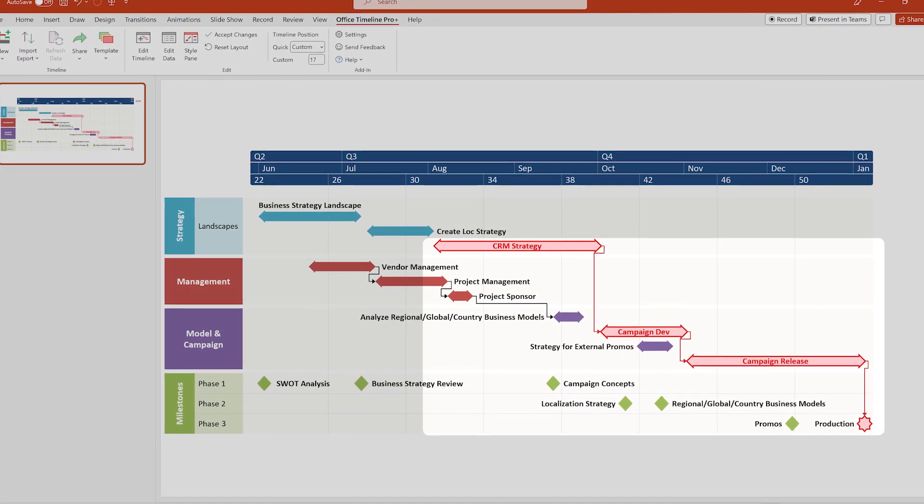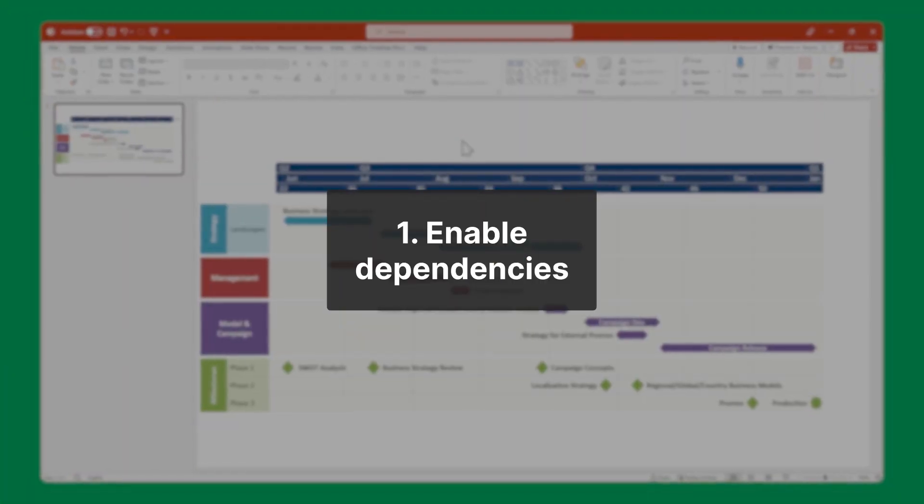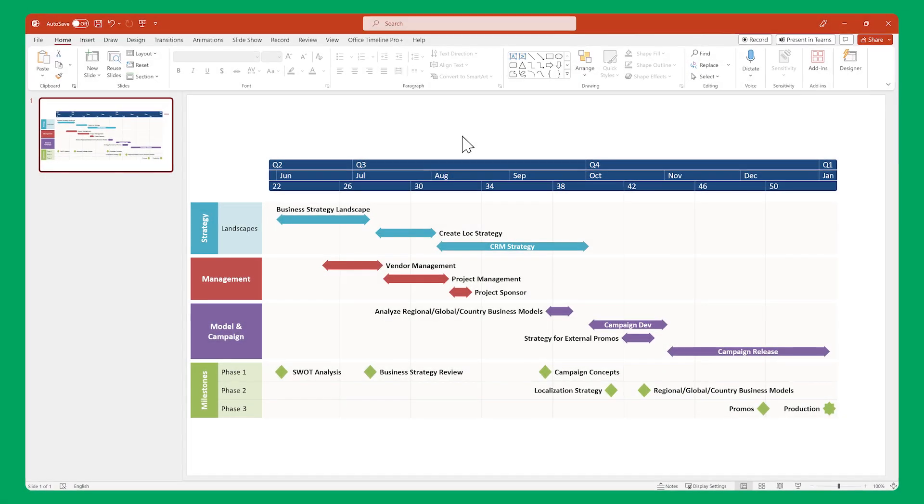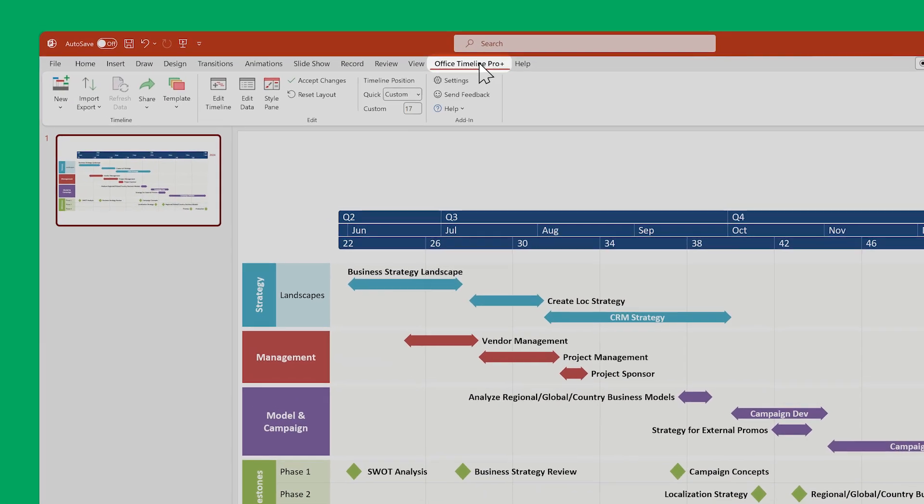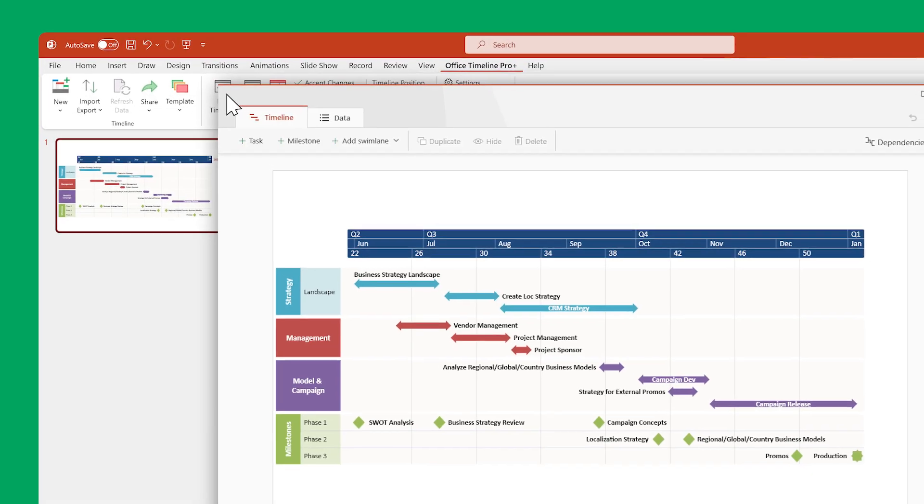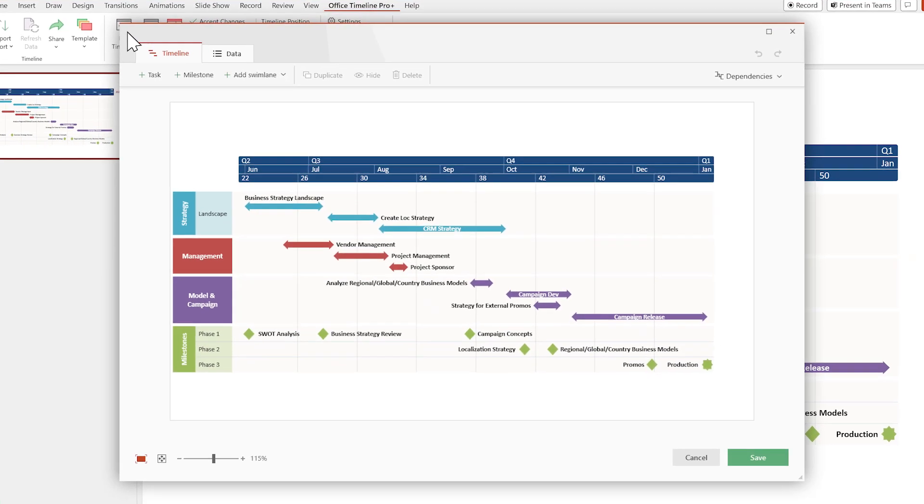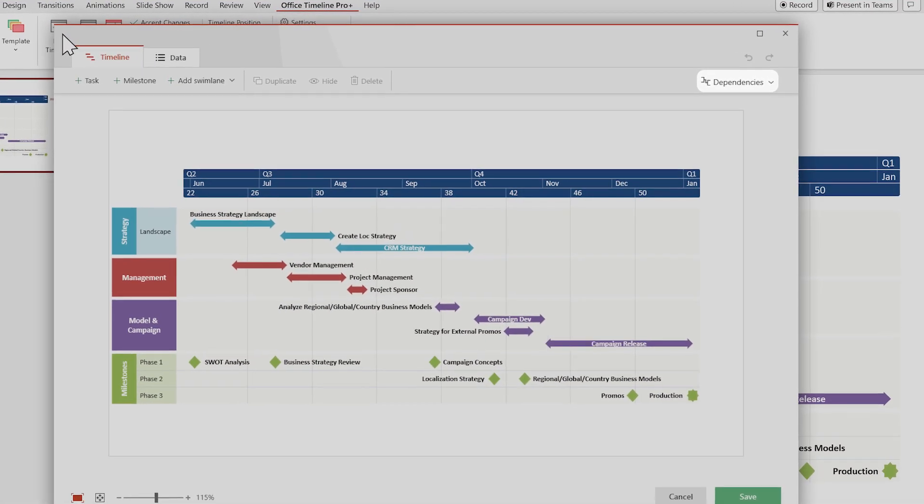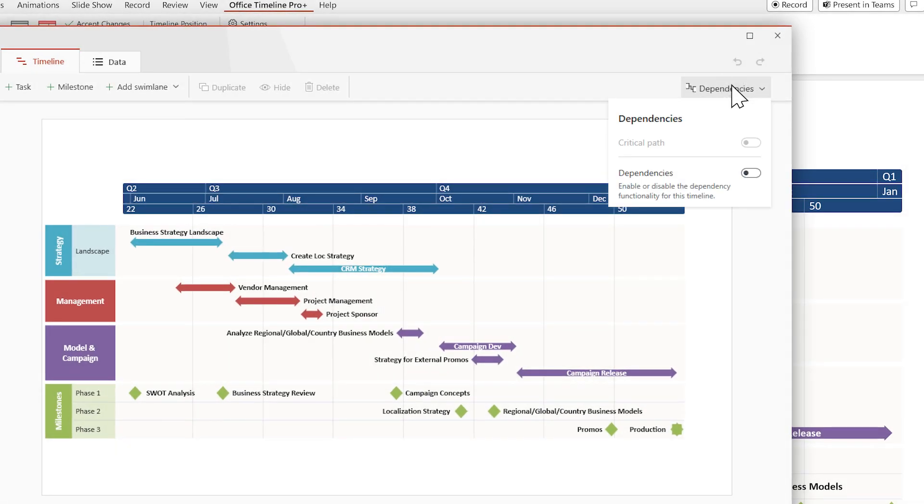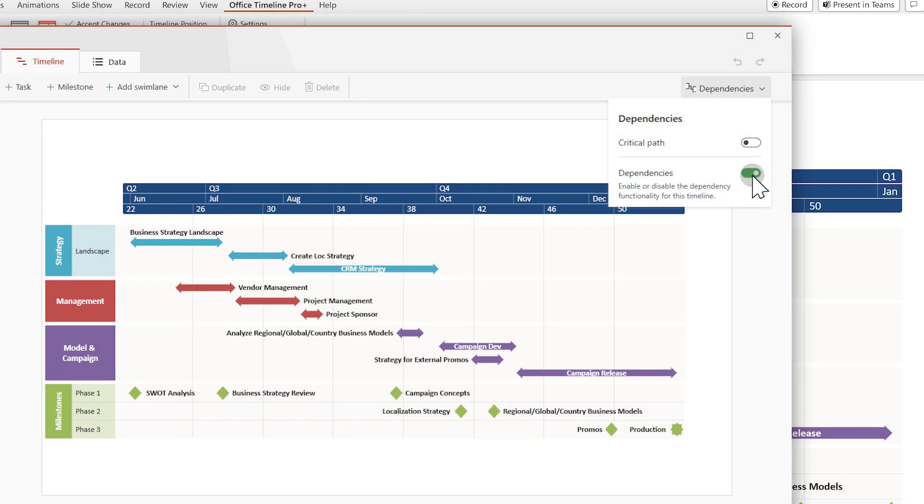But first you must enable the dependencies feature. To do this, go to the Office Timeline ribbon and click on Edit Timeline. Now look in the upper right part of the window and click on the dependencies rollout, and then click on the toggle button to enable dependencies.